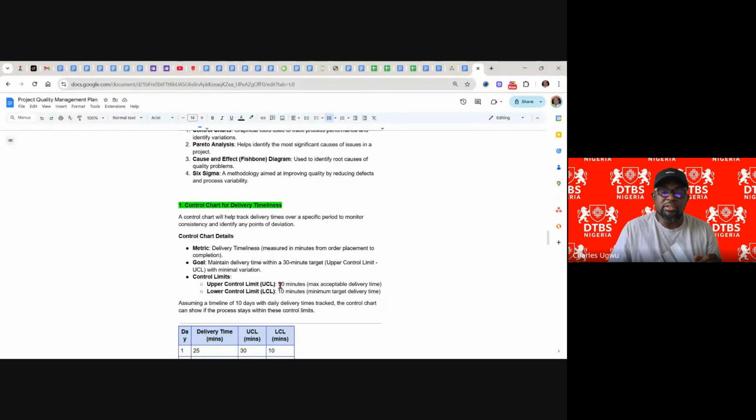Within these 2 minutes, we will say 30 minutes. Within 30 minutes of ordering, the food should be delivered. If it delivers after 30 minutes, that is the upper control. It means we have crossed this threshold. You are delivering it within 30 minutes. After 30 minutes, it should be questioned why. It should be within 30 minutes.